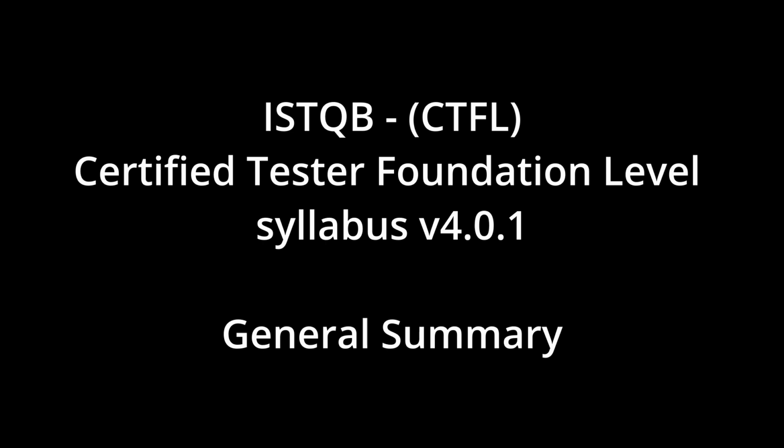What else? There's coverage-based prioritization, where you might prioritize tests that give you the broadest coverage of requirements or code structures quickly, or tests that specifically target areas not yet covered. Requirements-based prioritization involves ordering tests based on the priority assigned to the underlying requirements by stakeholders. And of course, practical things like dependencies between test cases and the availability of specific resources or environment configurations also affect the execution order.